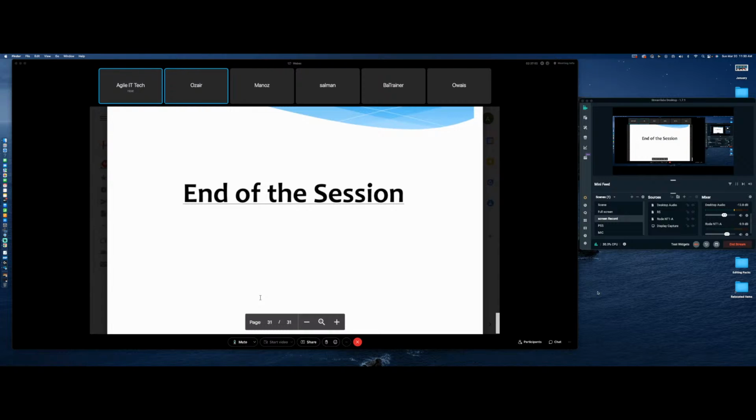Now, it could be that you are still gathering the requirements and you get more and more validations and other things. You've got to keep updating your document, right? The change request will not come unless you have signed off on the document. Remember, a change request only comes after the document has been signed off, meaning it's a change to the approved requirements, right?